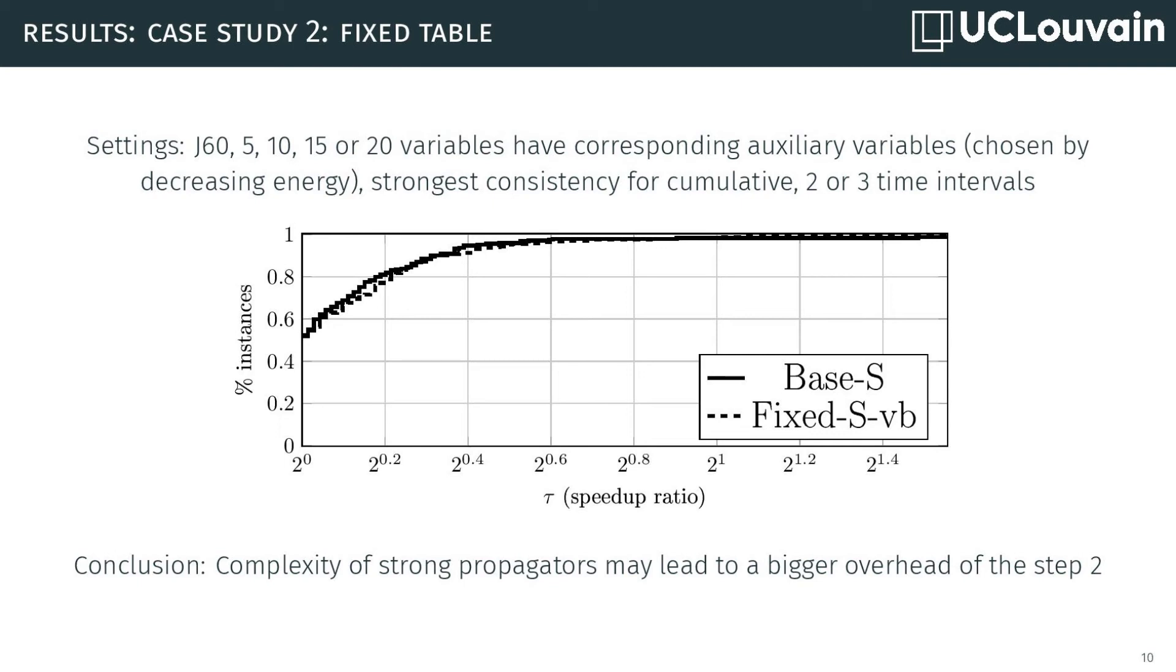On the J60 instances, the results were not so good. Here, the methodology brings an improvement in 50% of the cases only. Moreover, the improvement is at most a division by 2 of the time. We think this is due to the complexity of the energetic reasoning propagator we used in the model. We hypothesize that the improvement of time during step 3 brought by the table is totally subsumed by the exponentially growing time of using the energetic reasoning. But this requires more experiments to confirm.